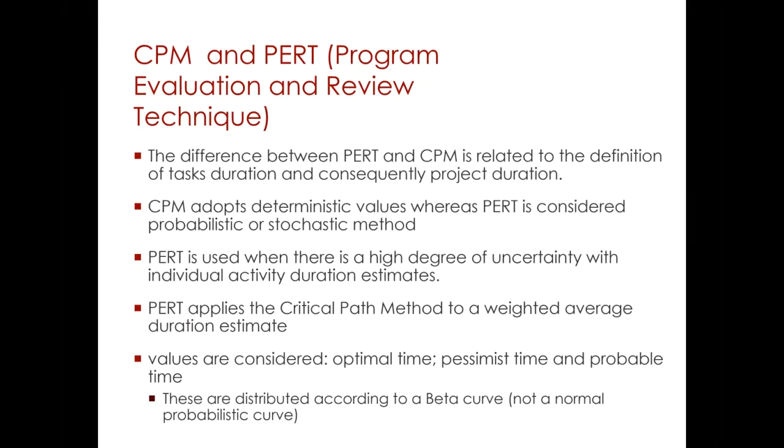The other concept which we will touch upon is the program evaluation and review technique. So the difference between the PERT and CPM is related to the definition of task duration and consequently the project duration. CPM adopts deterministic values, whereas PERT is considered probabilistic or stochastic method.